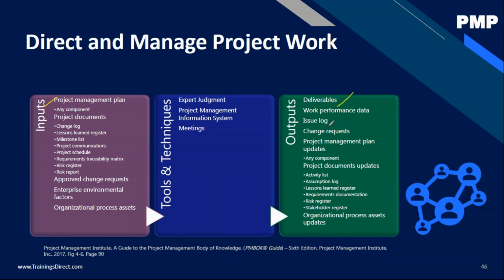And there'll be some issues during execution. So issues will get documented. Therefore, the issue log is created in this process for the first time. It may be updated later on in other processes. Updating is okay, but the first time it will be created in this process. That's why these are the unique outputs of this process.